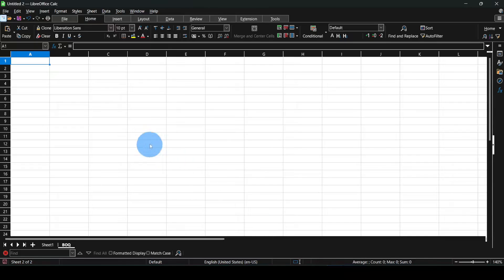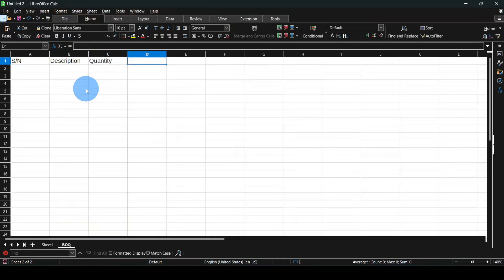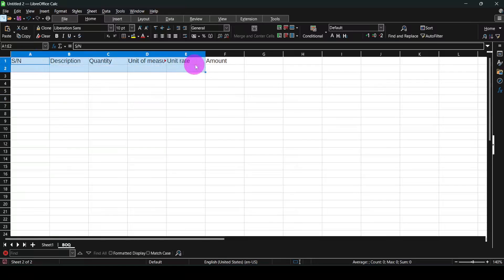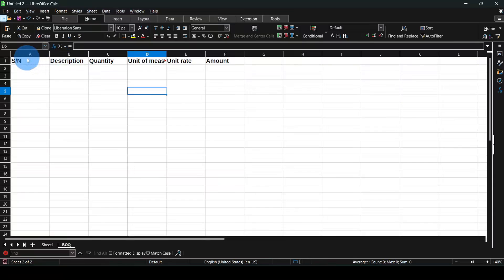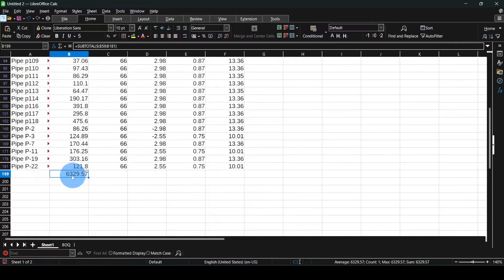I'll prepare another sheet and call it BOQ. For a standard BOQ, the first column is always serial number (SN). Then we have the Description column, then Quantity, then Unit of Measure, then Unit Rate, and finally Amount. I'll bold these headers. Now let's start with value number one — the total length for the first pipe was this value.